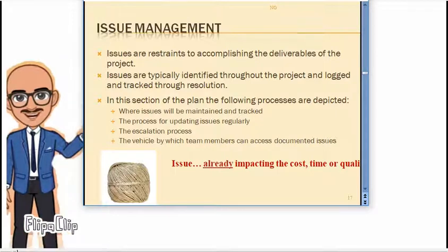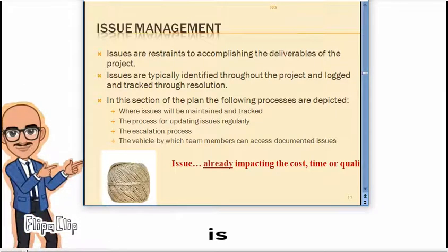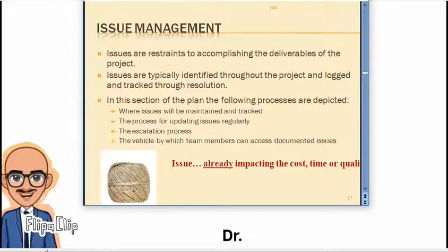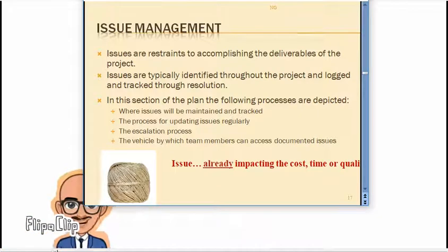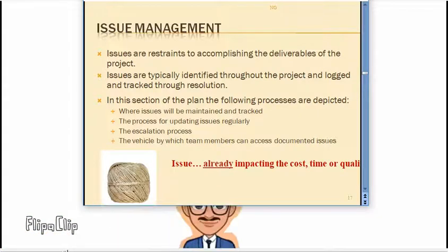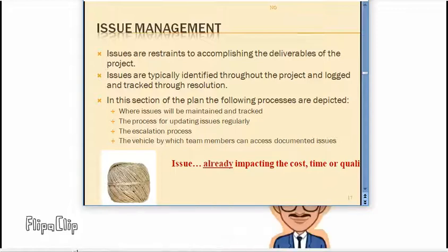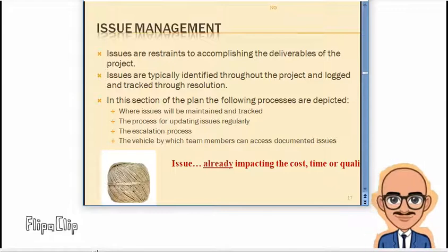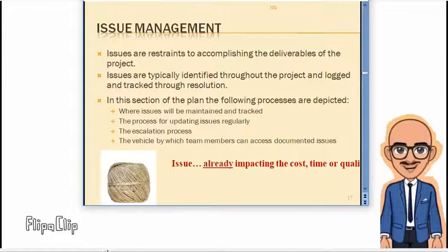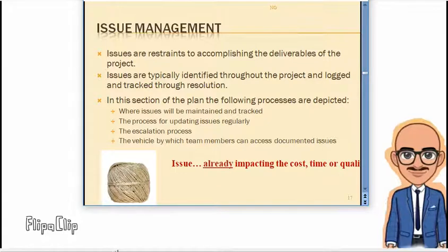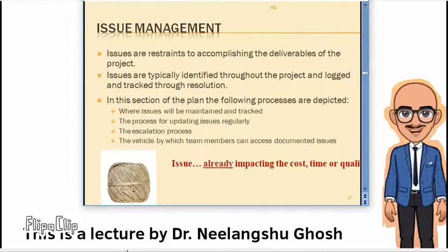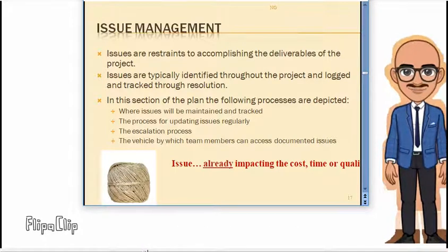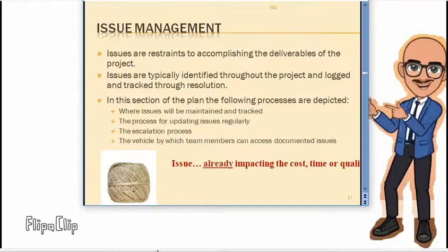In some cases, during implementation of the project, if you are delayed and not progressing properly, and you are not keeping the time frame you had thought of for the project, then sometimes you have to employ extra labor to make progress in such a way that you can keep the time maintained.